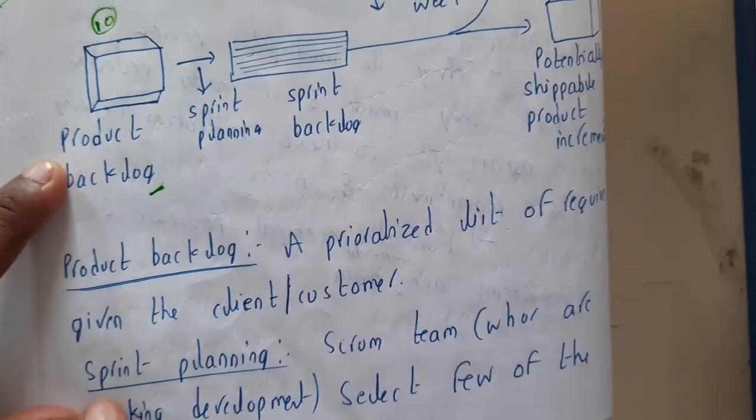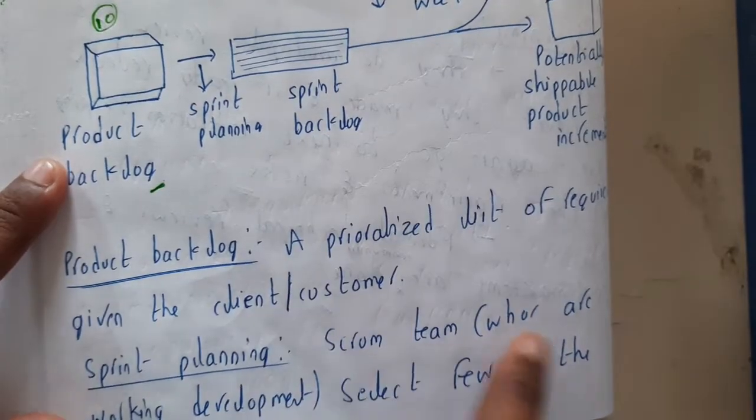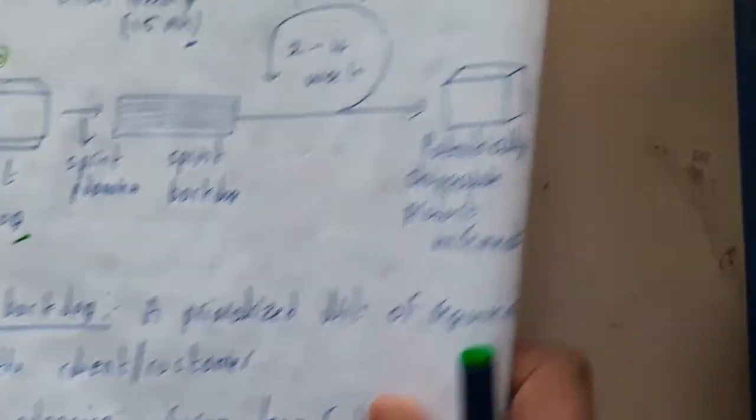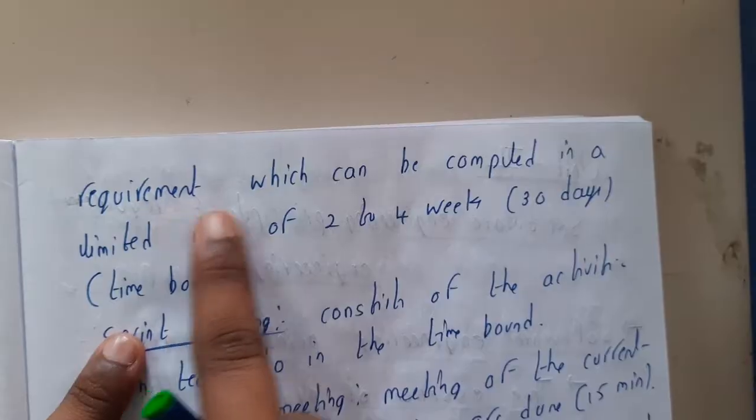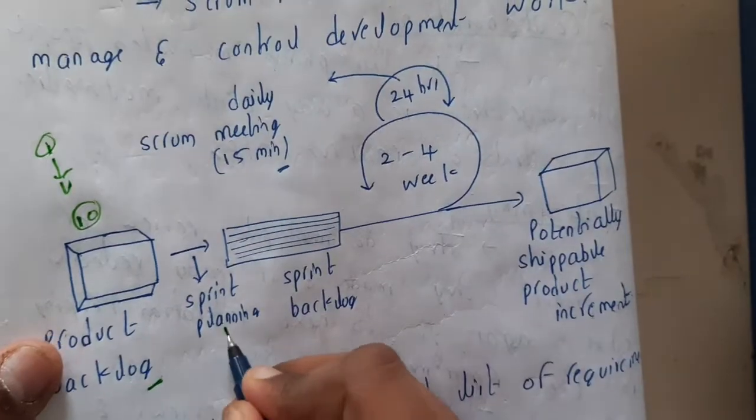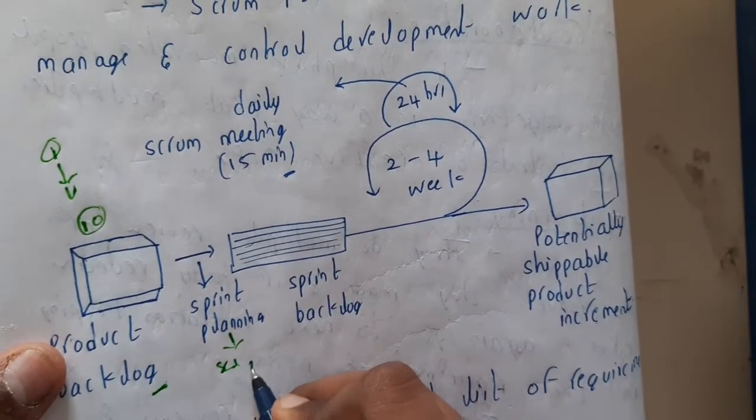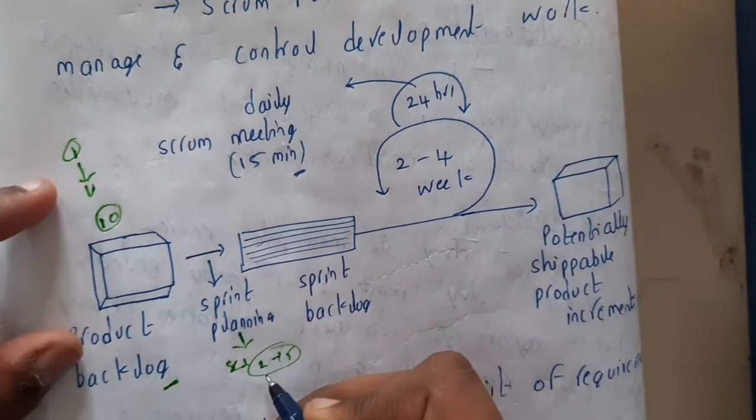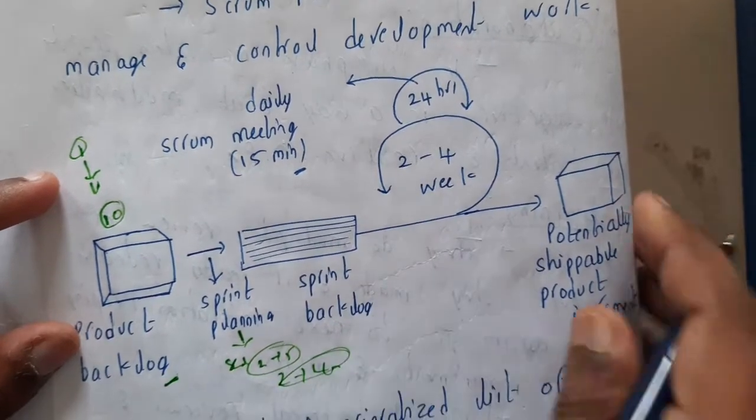Sprint planning is nothing but the scrum team who are working on development will select few of the requirements which can be completed in a limited time of 2 to 4 weeks. The team will be selecting some around 2 to 5 modules which can be completed in a span of 2 to 4 weeks, minimum of 2 weeks and maximum of 4 weeks.